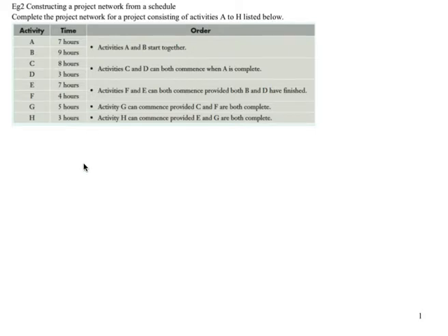So, what we want to do is to find the start point. Now, with these, I recommend drawing a nice big circle, because a big enough circle to fit your earlier start time and later start time in it if they ask you to complete a back and forward scan to find the earliest completion time, so the minimum completion time, and the critical path. So we're going to write here start. We always start at the start, and this is going to be our start point.